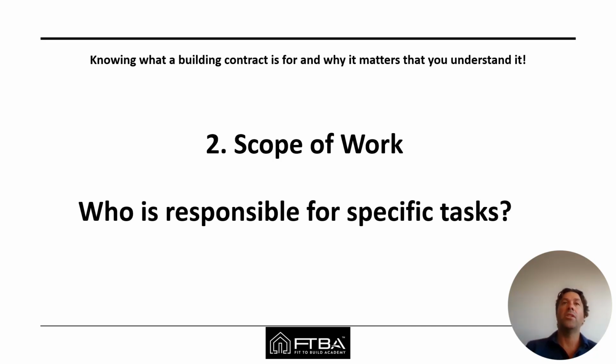There could be major issues where a client or builder issues a show cause notice, asking the other party why they should not be terminated for failure to act in accordance with the contract. This is kind of the absolute worst case, but I highlight here that a building project is a serious business, with often quite a lot of money and risk at stake for the homeowner and also for the builder.